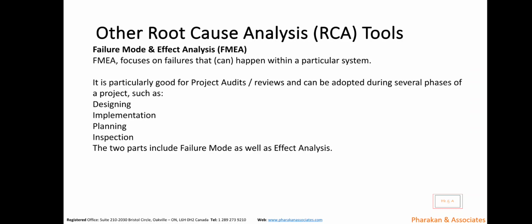they just leave it off to the IT guys. Oh, IT folks, they should know, they know what we want. Or the leadership of the user department who needs the solution have not committed the right resources. So there is a key guy who understands the process end to end, but then that guy is also bogged down with day-to-day deliverables, business as usual issues. So he cannot attend project meetings and be committed to the project 100% because there are reports he must deliver, there are things he must do. At the end of the day, it's a half attention kind of approach.